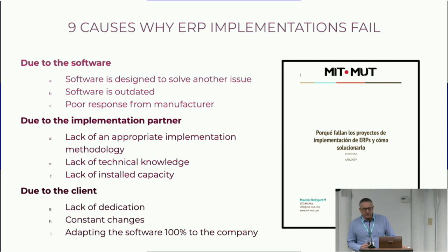Lack of dedication: when the company doesn't dedicate much to the implementation, you have problems. When the customer makes a lot of changes, you have problems. Or when the customer wants to adapt the software 100% to their practical procedures, you have a problem. This helps us, and every time a customer asks us, what is your methodology?